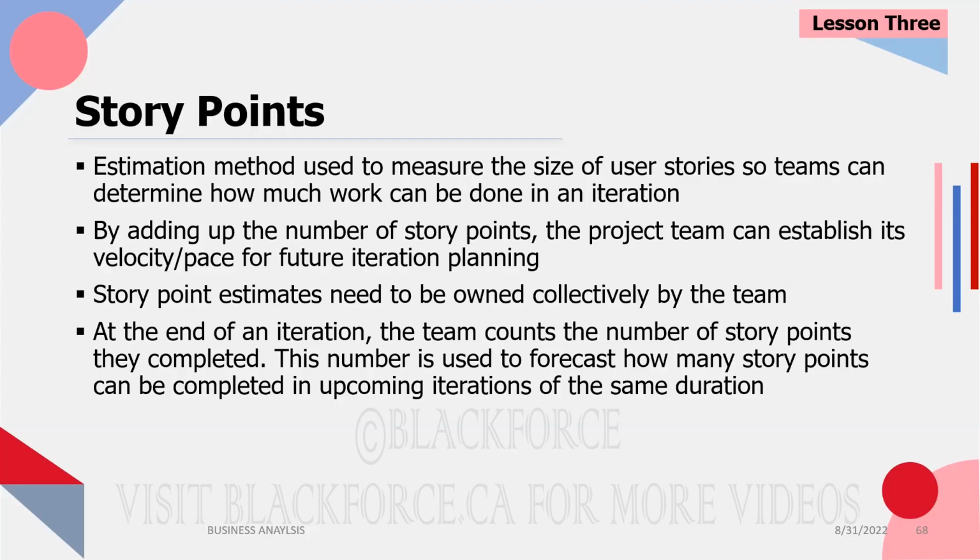What we mean by that is that, let's say we're doing sprint 1. We're going to select 5 user stories. User story 1 is 3 points. User story 2 is 5. User story 3 is 7. User story 4 is 7. User story 5 is 7. Okay? That, I believe, is 29 points in total. Let's say our sprint is 2 weeks, right? And we completed all 29 story points in 2 weeks, right on time, right? It took us the entire 2 weeks to complete it.